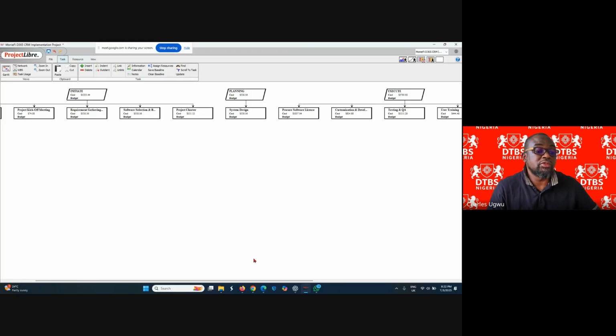We'll either reduce the number of days, or reduce the costs we pay. That's how we continue to refine it, and we'll get what we want. So for instance, if this one is the execute stage, you see it's 3,000. If we feel it's too much,